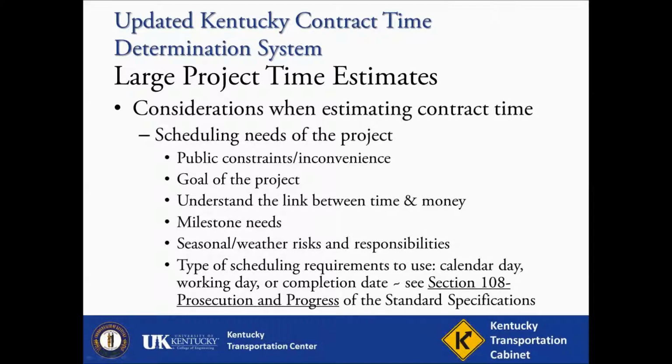To use working days, a conversion is required to manipulate the contract days into working days through estimating adverse weather days. This type of contracting charges a contractor only when weather conditions allow work on controlling operations. This allows the contractor to shed some risk associated with weather, but is problematic for construction staff to monitor and document.